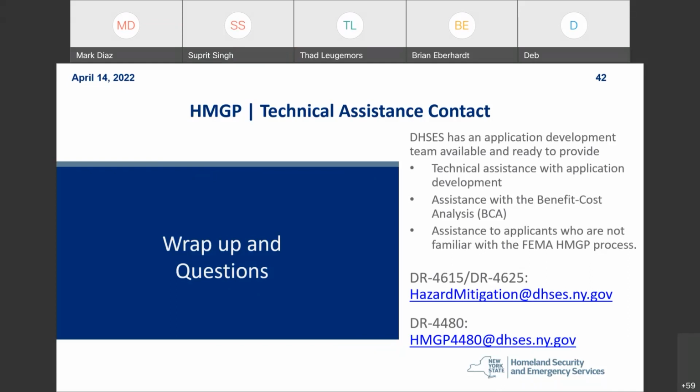So you can do multiple addresses, locations by adding additional mitigation actions to the same project. There's a question right now that the BCA toolkit only asks for one address. How do we deal with multiple locations? You do the analysis for each location as a separate mitigation action.